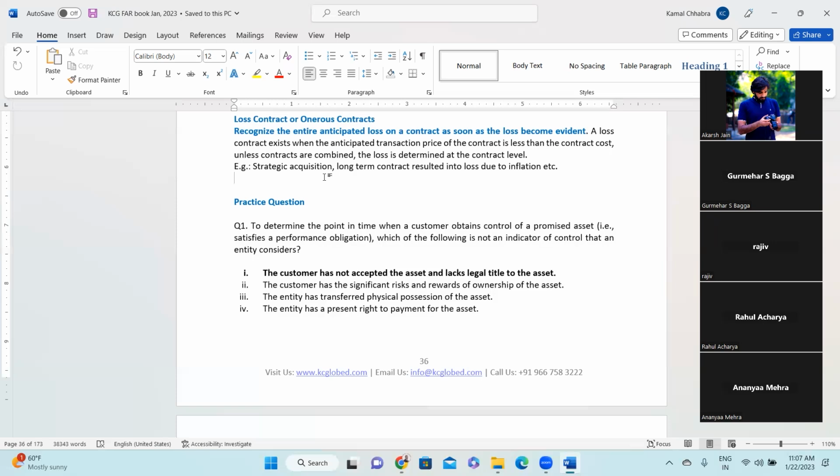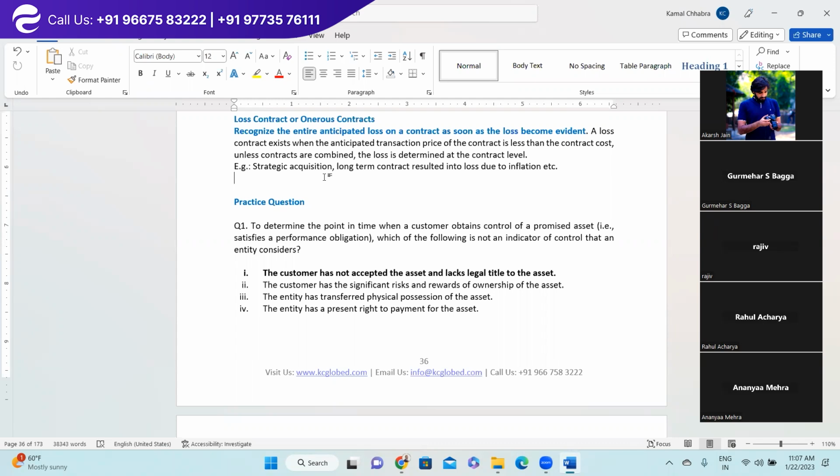Yeah, very, very good example. So here, from all the examples you have shared, there are two, three things. One is, at the inception, you might not have considered the contingency, or might not have done a proper estimation of the cost. That is one reason. Second, maybe we have not drafted the contract properly, and it may not have an escalation clause in case of inflation impact, right?